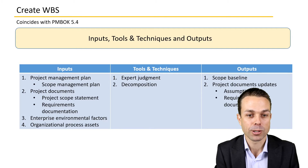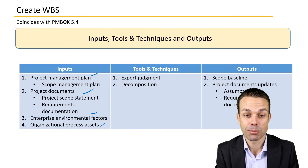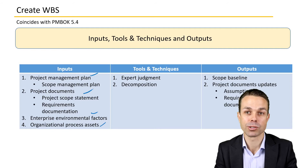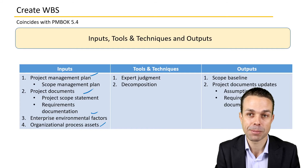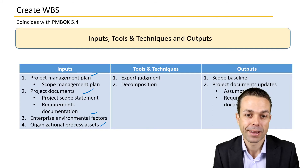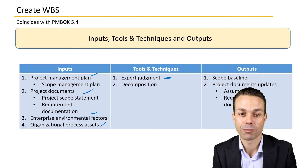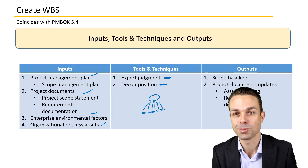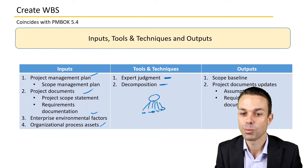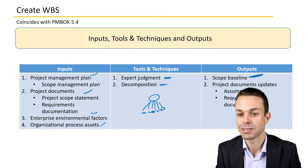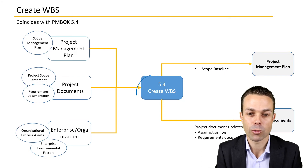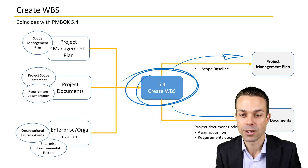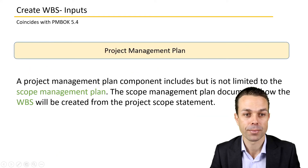For inputs, tools and techniques, and outputs: we have the project management plan, project documents, enterprise environmental factors, and organizational process assets as inputs. The project management plan is one of the inputs in almost all of the processes you will see. Tools and techniques include expert judgment from experts in relevant areas, and decomposition — breaking things down into smaller and smaller levels. Outputs will be our scope baseline and project document updates.